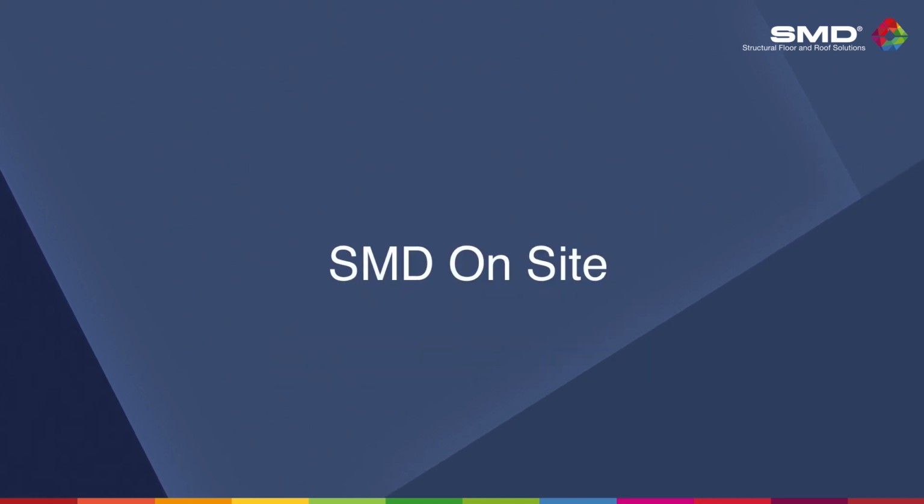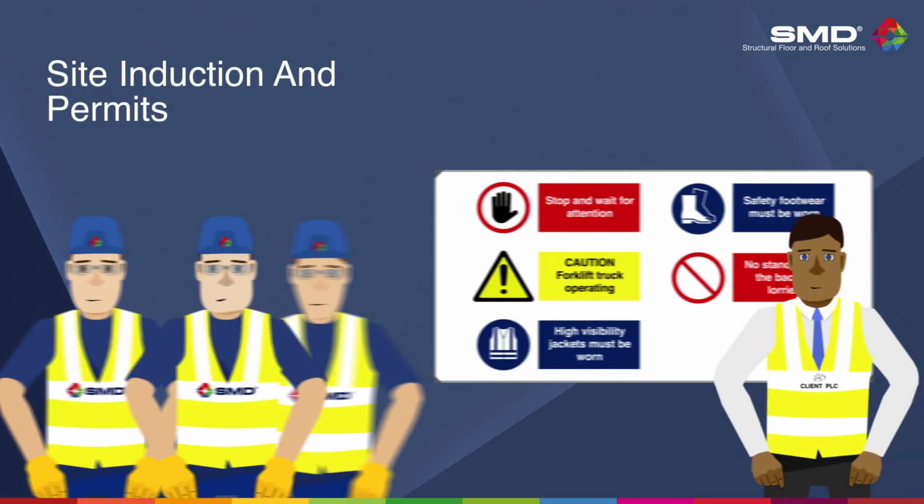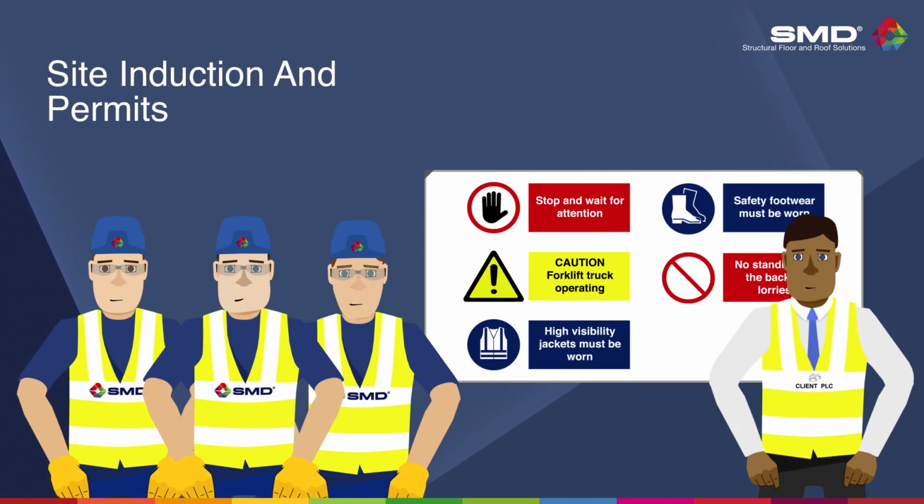When SMD's installation team arrive on site, key tasks need to be completed. Training certificates and qualification cards will need to be presented at site induction, and relevant site permits will need to be completed before work can start.